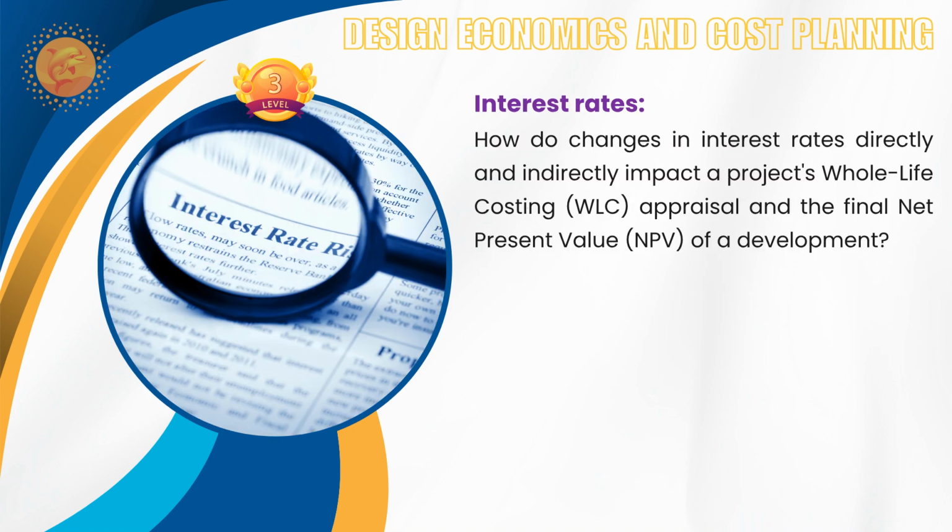So next one is again this interest rate. It is going into detail on how it will directly or indirectly impact a project's whole life costing, appraisal, and the final net present value of the development. So this is also when you are considering the interest rate. This also determines the discount rate applied in the whole life cycle costing, either whole life costing or life cycle costing. When you are applying the discount rate, it is also derived from your available interest rate.